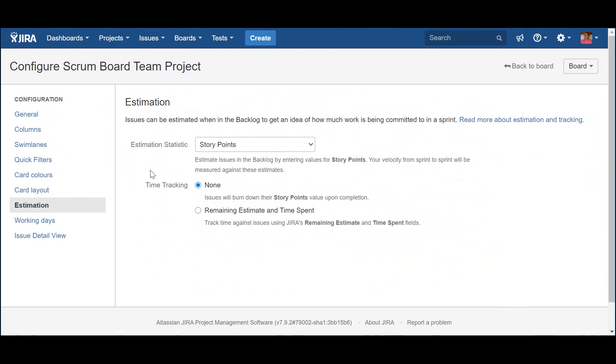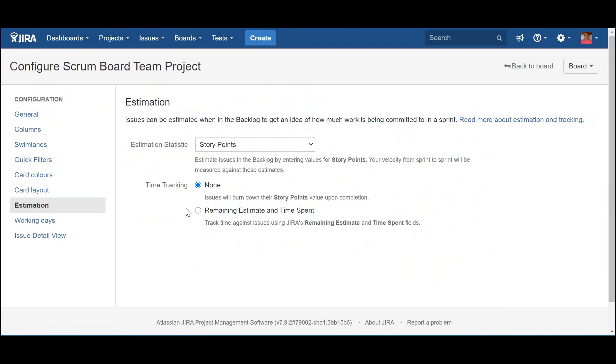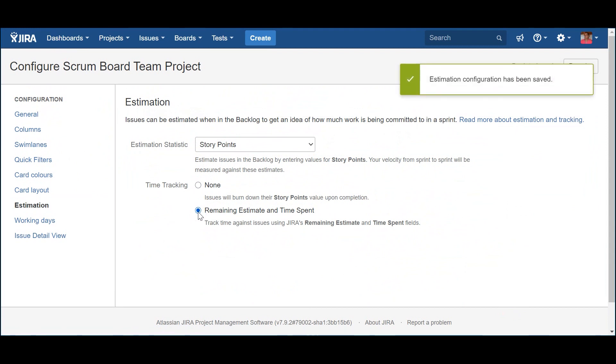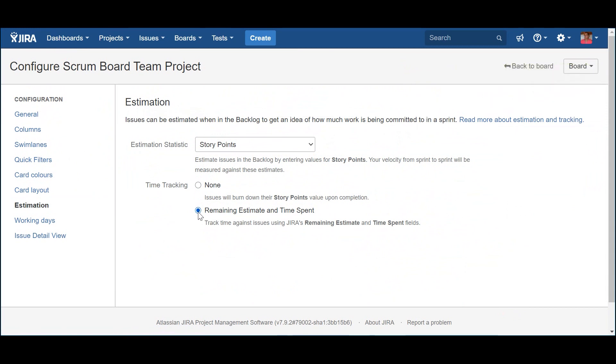Finally, last but not least, a very important aspect is related to the units used in this scrum board for estimates. I'm sure you will not be surprised that I chose story points. Now, when it comes to time tracking, I'm a big supporter of using both remaining time and original estimates, because I believe the planning of each iteration should consider all required subtasks estimated in hours. Like this, every time the team updates their estimates about the remaining time left to complete each subtask, the burndown chart gets updated with that information. In one of my next videos, I will show how the burndown chart is influenced by the regular updates of information made by the team members.